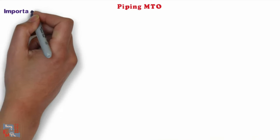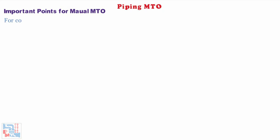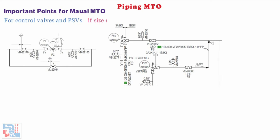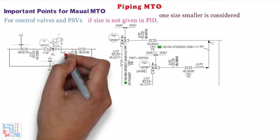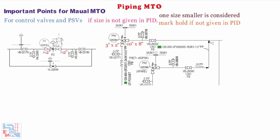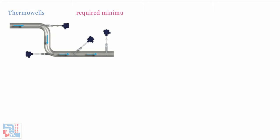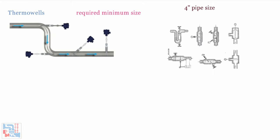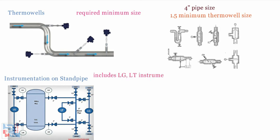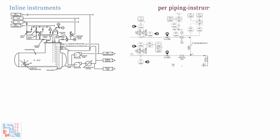Now let's look at some important points to remember while calculating manual MTOs. For control valves and PSVs, if size is not given in the P&ID, one size smaller is considered, and mark hold if not given. Consider end user requirements of instrument air supply lines or manifolds as per project standards. Thermowells require a minimum size — for example, a minimum 4-inch pipe size requires a 1.5-inch minimum thermowell size. MTO for instrumentation on standpipes, which includes LG and LT instruments, vent and drain, and standpipe, is taken as per P&ID or standard assembly. MTO for inline instruments is properly considered as per the piping-instrument interface diagram.